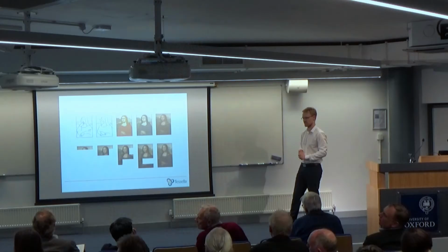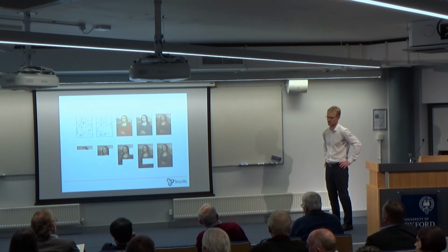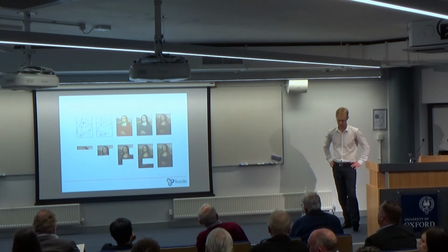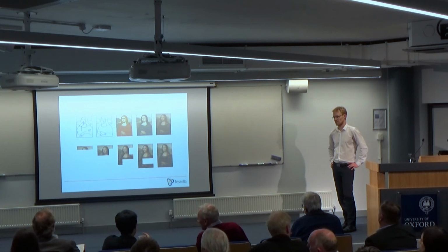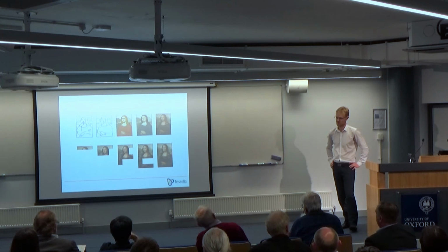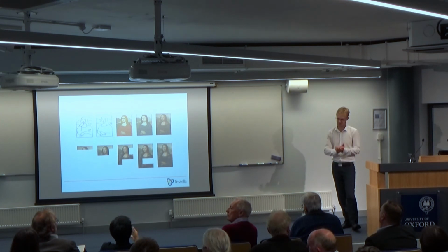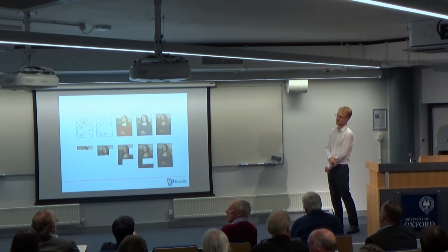When you focus on the big things first, this is the thing. If you start with a lot of requirements, you end up with a load of low-level requirements, which may or may not be important, and they may or may not be right, because they're based on somebody's perception of what the system will look like, which may not be what it looks like when it's been built. So by focusing on the really key things, and then using that to shape the thing, you've got your scope, and you've got what you're trying to deliver. The area you're prioritising is the lower level requirements, and in many cases that's typically what gets changed.